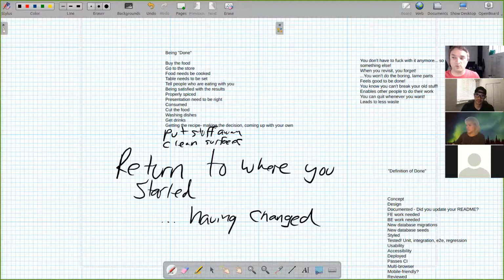One of the things you figure out real quick when you start doing this is, oh, everything takes way longer when I take into account all of the work that goes into it. But here's the thing, that was always the case. That's why you get projects that are, oh, we're 80% done, and then they stay 80% done and don't move for months, because nobody took into account all of these other things. If you're doing all that stuff as you go, it also unlocks the ability to correctly estimate your work. Weird.